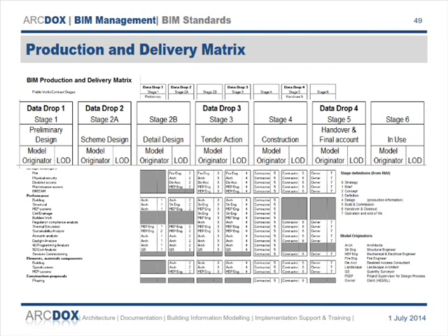Okay, so that's a part of the EIR, and that's a document that then gets developed further as you go through the project by the contractor, because at the beginning stage, you may have a whole chunk of stuff that's just the responsibility of the contractor. What the contractor should be doing is taking that and saying, well, that bit's the responsibility of the steelwork contractor, that bit's the responsibility of the windows glazing contractor, as you go through the project.